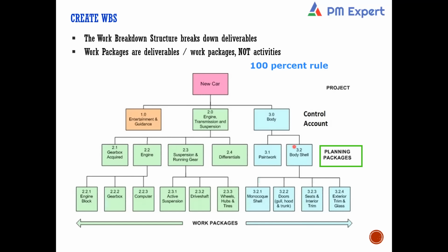Now, with that data, which is called actual cost, you can calculate various parameters such as cost performance index, schedule performance index, cost variance, and schedule variance, that we are going to do in subsequent classes, very shortly. And based on that, you have to manage the project.